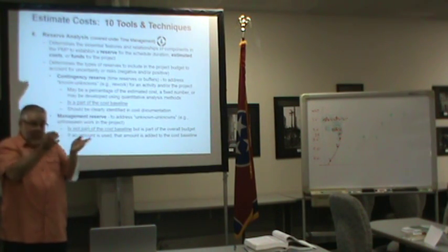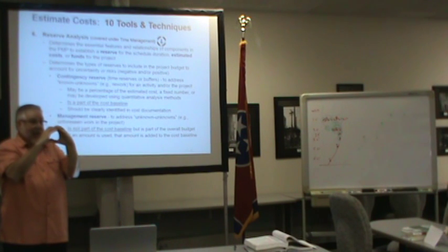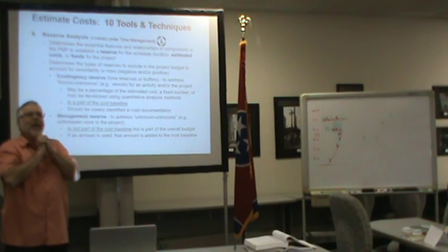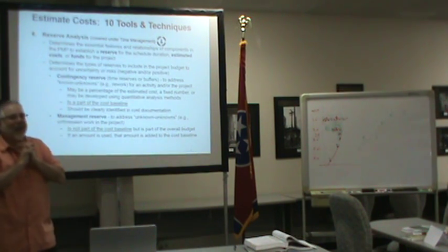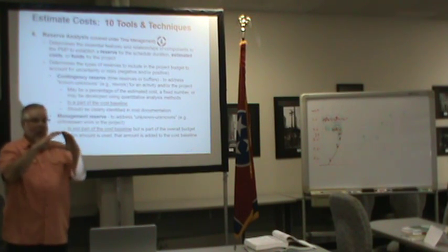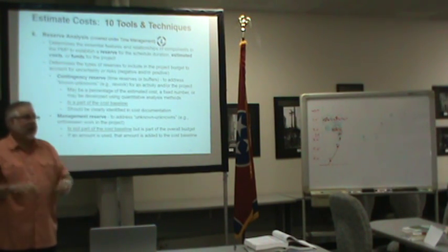Because if you can really box that scope in like this, then everything outside that scope is what? Money. Change order, right? Or what do we call it? A REA, request for equitable adjustment. Yeah, REA, request for equitable adjustment. So that's a great point for us as project managers to realize.